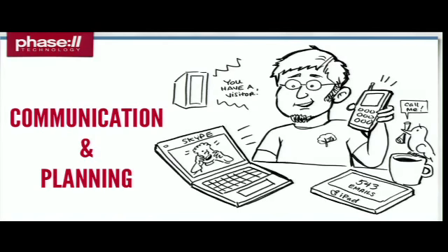Other things have a lot to do with in-person versus phone calls versus Skype versus Google Hangouts. It's very important that you establish the manner in which you're going to communicate with all the people that Chris was referring to, the stakeholders and all those partners and all those people. Establish all that in your communications plan up front. Expect that it's going to change, but at least agree on it and agree to change it as the project proves that those aren't the best methods.